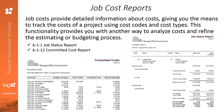Then you've got your Committed Cost Report. This one shows you, in detail by cost code, how your budget and approved change order costs compare to those costs incurred and what you've committed. This report also includes uncomputed payroll with an estimated labor burden, so it's great if you are putting in all of your hours immediately — it'll give you a lot of great detail.